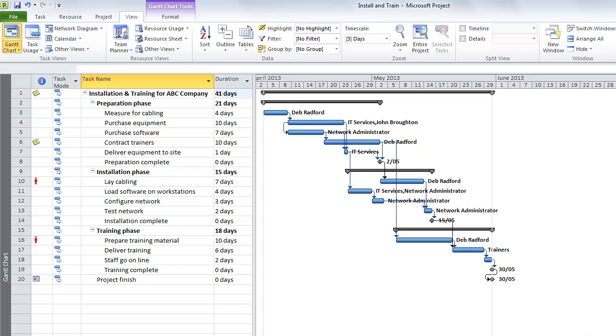Before doing this, we always recommend our clients apply grid lines to the background of their Gantt charts. Microsoft Project uses a lot of room on your screen, and when you're using a larger monitor, it's often difficult to find out what Gantt bar corresponds with which task. So the easiest way to deal with this is to put those grid lines on your screen.